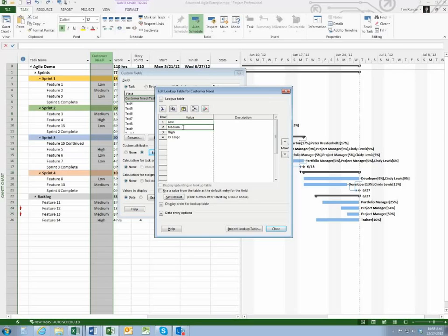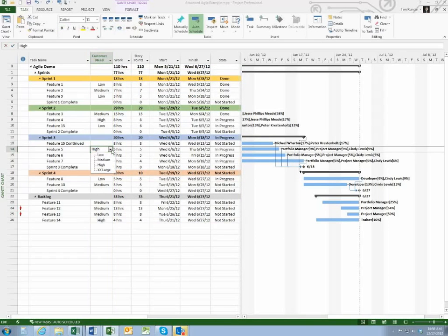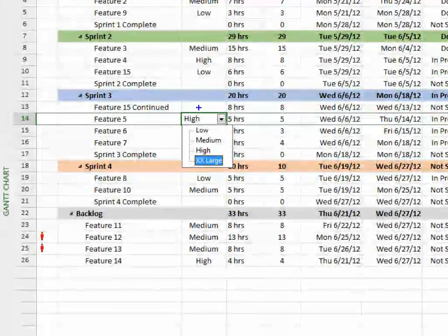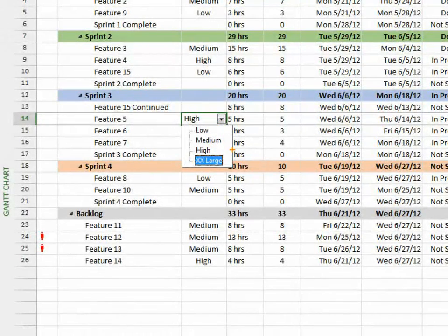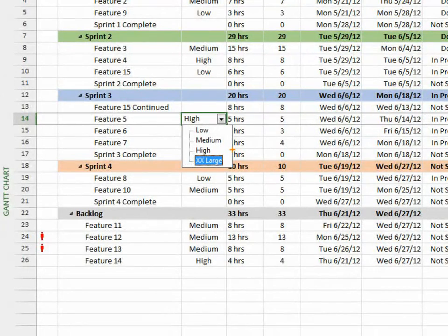And again, this is a little bit easier, but it has a little bit of a nuance that a lot of people forget. So when I go into story points, you'll notice that I can create flavors or numbers of those. I would rename it. But if I come in, I just chose a number field. I also told, and this is the important part, that for calculation to summary rows, I want it to use either a formula or to sum up the numbers. So remember, as we move tasks in or we change the numbers, we want that to roll up to a summary task, which is important.